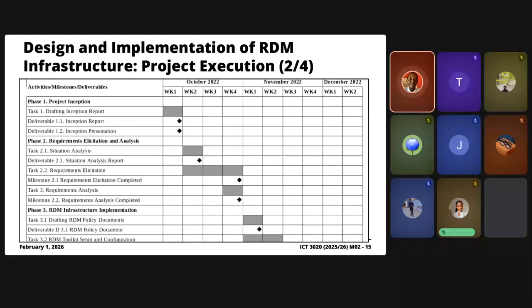So you will notice when you start looking at project management that we will make a distinction between the generic task, a milestone and a deliverable, right? A task is like a thing that you do, right? A deliverable and a milestone are things that you do, but they're special types of tasks. And they're special because the duration is always 0. In other words, you do them right there and then.